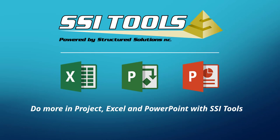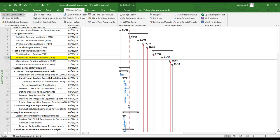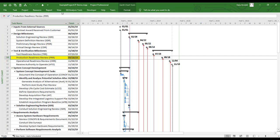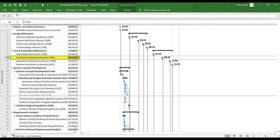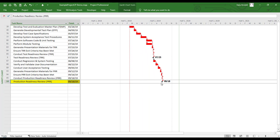Now I'll demonstrate how to use SSI Trace Tools using an example Microsoft Project file. Below the SSI Analysis Tools menu, I'm looking for the button named Trace Driving Path. First, I'll select an item in the schedule — row number 10 in this example. Then I'll click the button, wait a couple seconds, and displayed now is the longest series of tasks leading to Production Readiness Review.